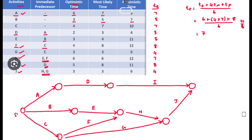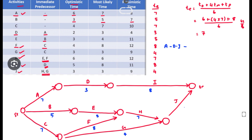Now we can write the network paths. The path containing the maximum duration is the critical path. The first path is A–D–I, with estimated times: A = 7, D = 3, I = 8; also B = 5, C = 7, E = 5, F = 8, G = 4, H = 7, J = 4.